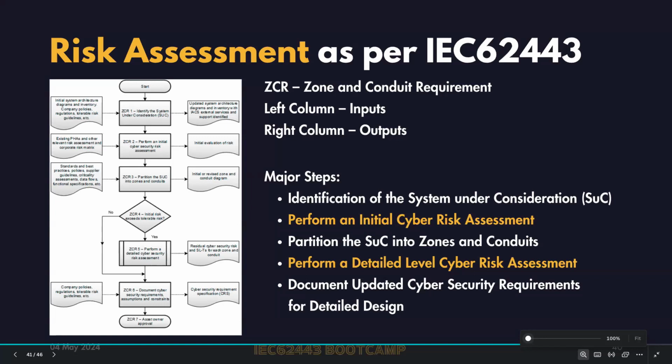Let's say your security level requirement is 3 and you have not done your risk assessment and you purchase a security level 2 compliant product. Now the problem is you can't achieve your security level unless you either replace the product or put in compensating countermeasures. So you do the risk assessment during the design phase itself, with some high level understanding of what your potential requirements would be.